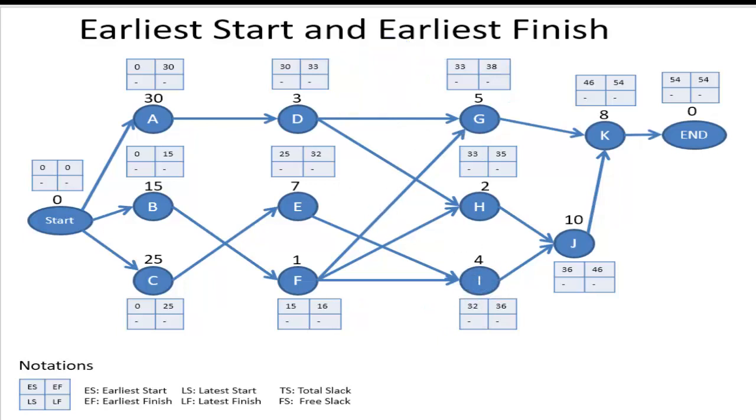So what is going to be the finish time? Finish time is simply the start time plus the time. So that is 33 plus 2, that is 35. Now here 32 plus 4, that is going to be 36.